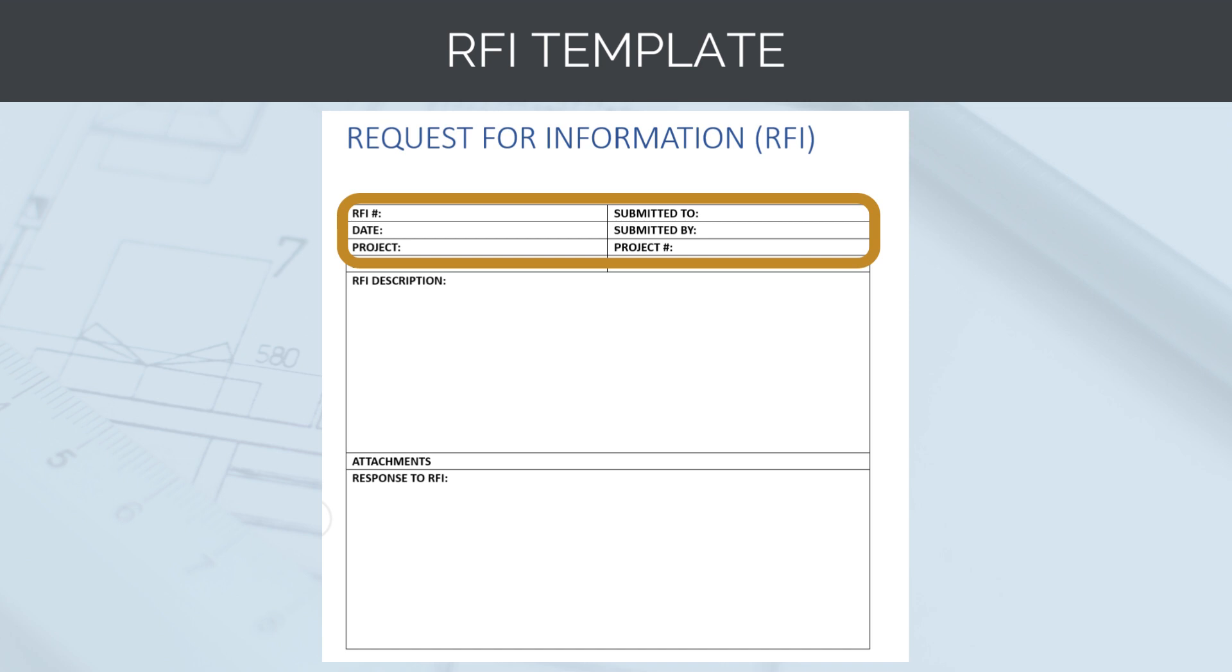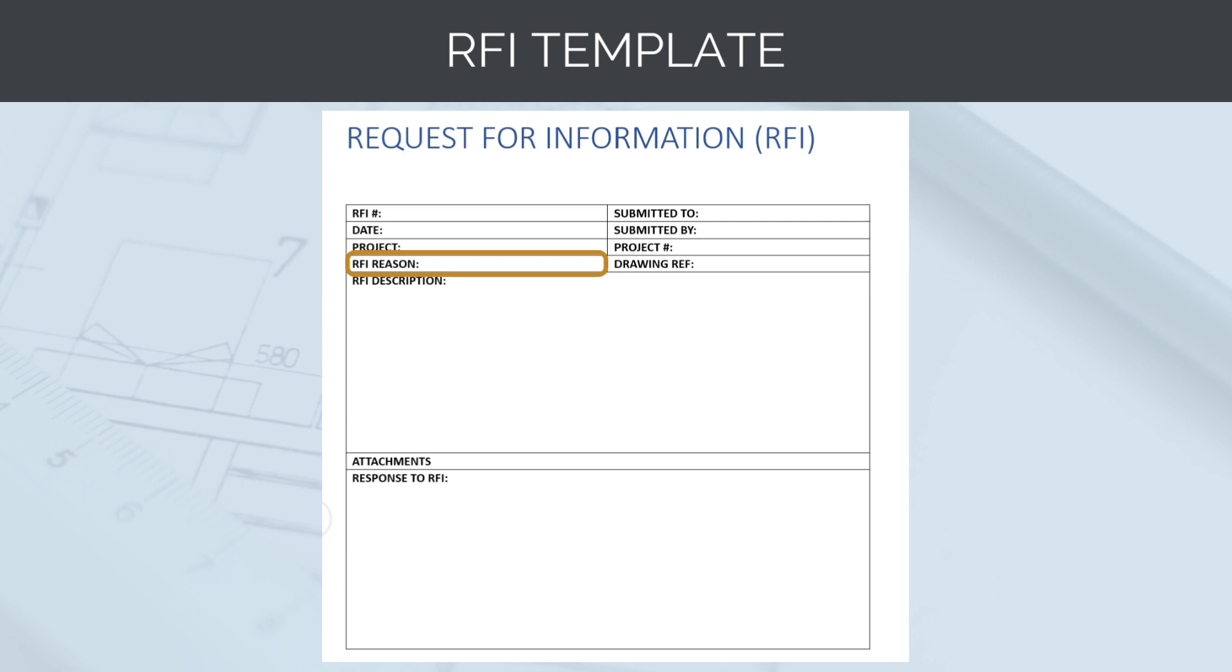We also need to enter an RFI reason. We need to note down, is the RFI because of missing or inaccurate design information or is it a proposed value engineering change by the construction team? This is important to note because it has commercial implications for the designer.